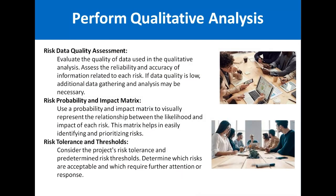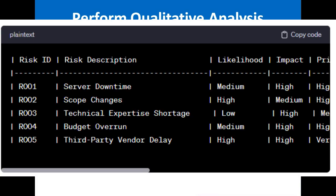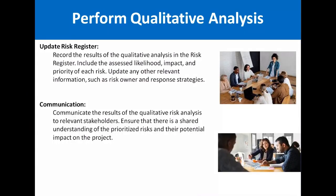The risk register should be updated to include the assessed likelihood, impact, and priority of each risk, along with any other relevant information such as risk strategies. The risk register is a very important document — whether you are working in any organization or planning to give the PMP exam, you must have a clear understanding of the risk register.